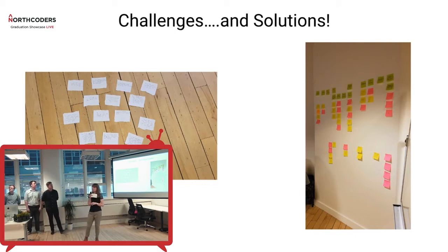One thing that we think we could have improved on would have been we created a Trello board, but we didn't end up really using it very much. We had a lot of different ways of tracking our progress through the 2 weeks, and it would have been good to have this in one area. So we should have really had a Kanban board.